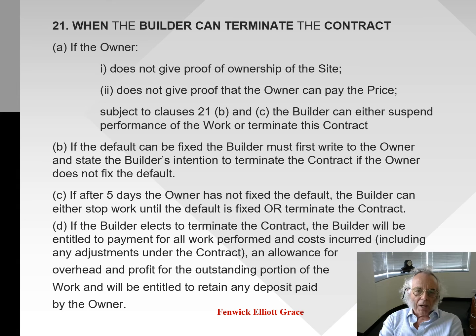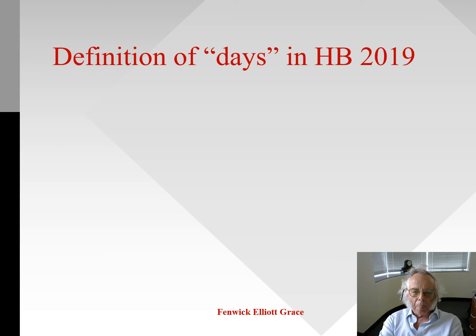So that's a very powerful clause, but obviously it only works if we can get through that hurdle in clause 21A. And those 2 possibilities are that they don't give you proof of ownership of the site and don't give you proof that they can pay the price.